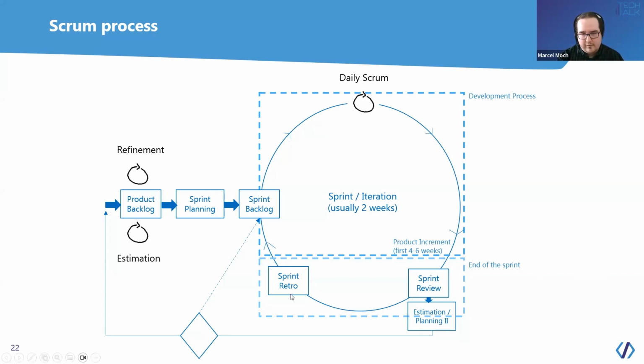And we also have something called the sprint retrospective. In an agile process, you try to continuously improve the processes that you use to work on a project. We check what went well, what might not have, and try to improve the overall process. Let's say we should have asked the customer earlier about some unclear thing, or the release did not go well, so we try to evaluate what went wrong to improve for the next iteration, for the next sprint, and for the overall project.